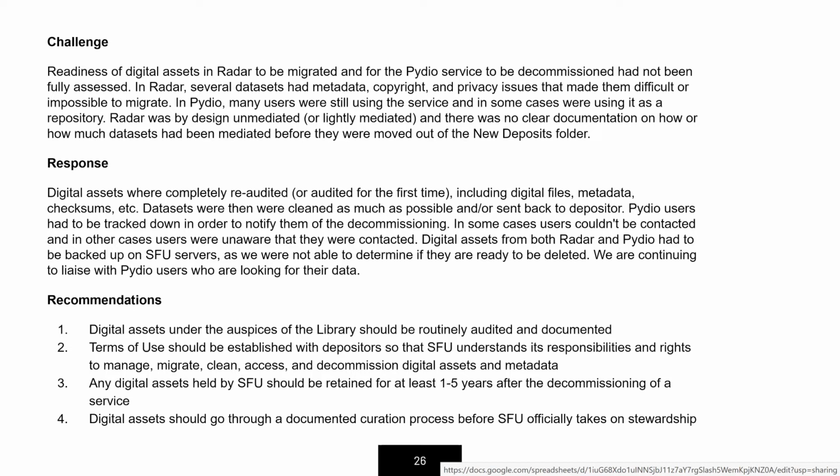This was an urgent issue that central IT needed to address. I won't go into details, but we were one of the victims of this expedited migration. So we needed to migrate this thing in 2 months, where we had a 10-month project timeline. As you might expect in that kind of compressed timeline, there were a lot of challenges and some successes.